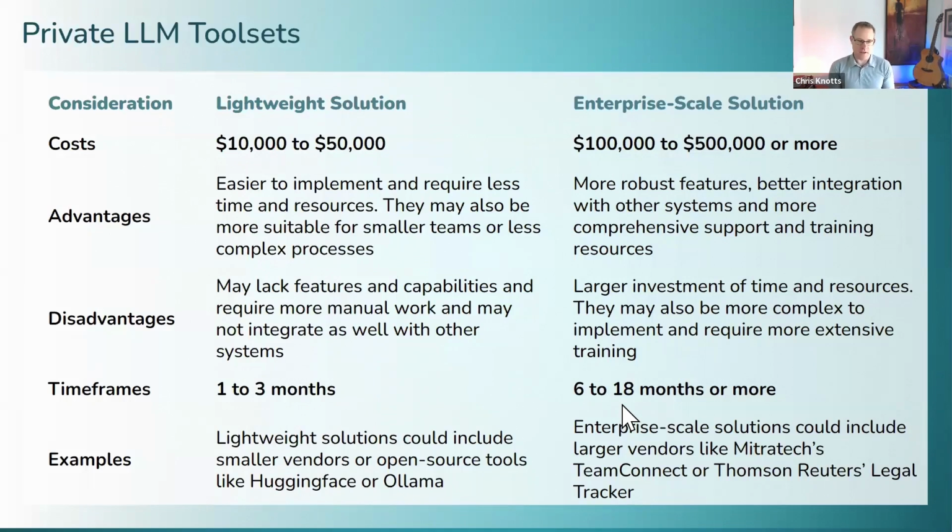When I was modeling my scenario for next week's project management class, we have a whole private LLM project implementation scenario fleshed out here, and we feel 6 months is definitely the minimum. Probably a bit ambitious, actually, but depending on how sophisticated it's going to be, you could be looking at a year-long project here.